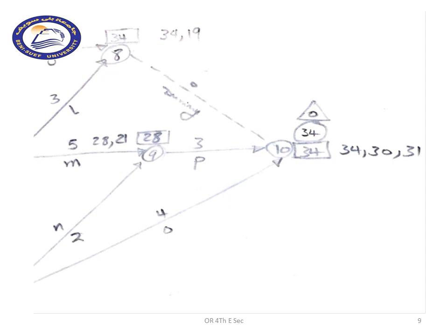Here we reached 34, so the time late, which will represent the latest allowable starting time for the project, which here represents the end of the project, will be the same as the number we reached at the earliest possible starting time, which in our example is 34.